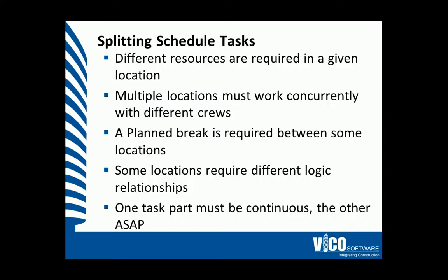We split schedule tasks for a number of reasons. We can split them because we need to assess and define different resources for a different location. Alternatively, we understand that multiple locations must work concurrently as different crews. We can also split tasks to plan a break between some locations, or we need to define logic relationships differently. We can also define schedule tasks by splitting them if we must make one part continuous and the other ASAP.